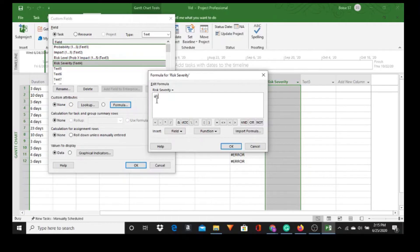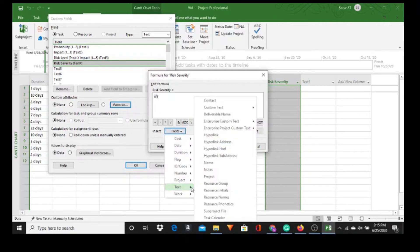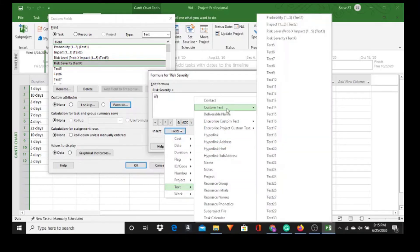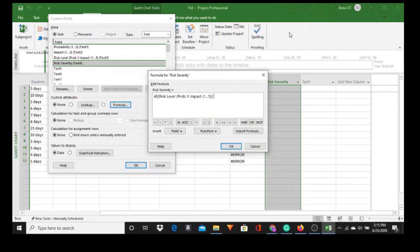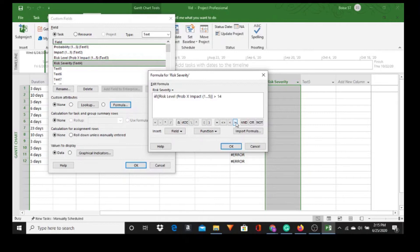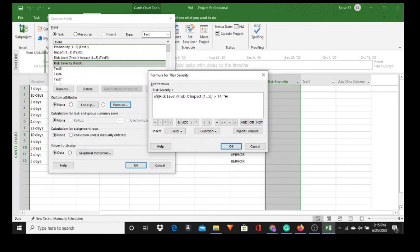So we want to if Text, Custom Text, the Risk Level Text 3 is greater than, and I'm going to pick 14, comma space open parentheses. If it's greater than 14, it will be High. Close parentheses, comma space.